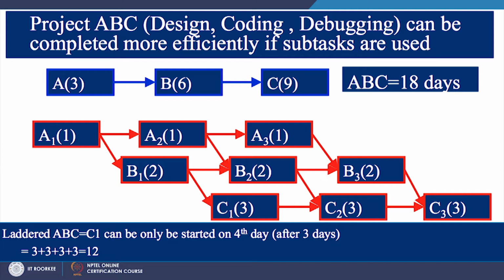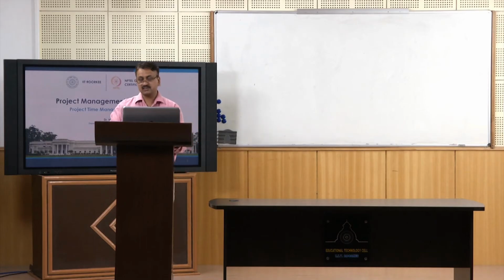So this is known as laddering, a very effective method of reducing the duration of the project. In fact, the concept here is that there are some successor activities you cannot start unless and until you completely finish the preceding activity, but you may have a set of activities wherein you can start the succeeding activity after a few minutes of the start of the preceding activity.